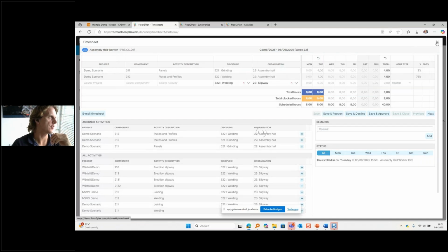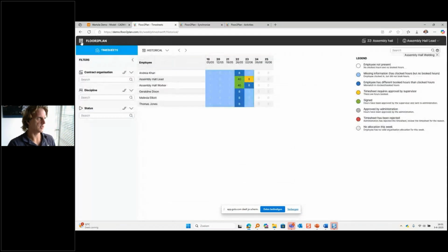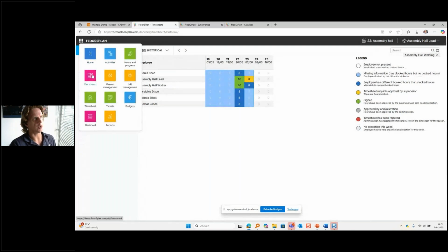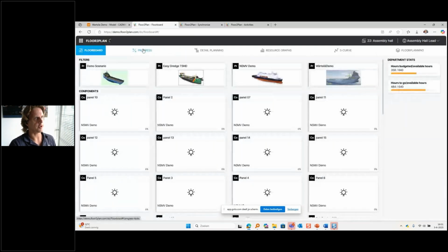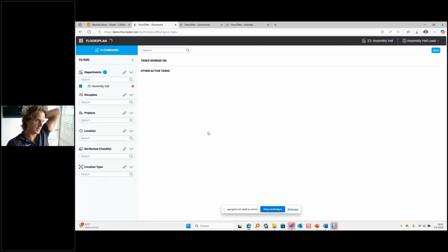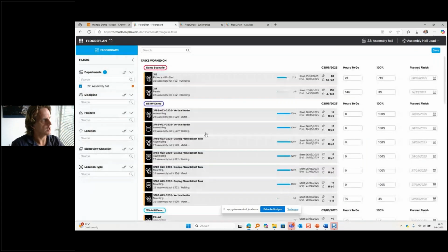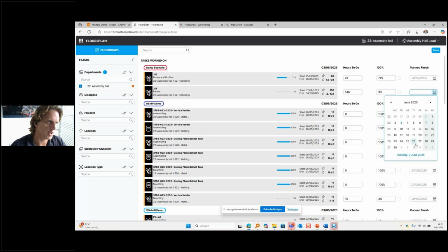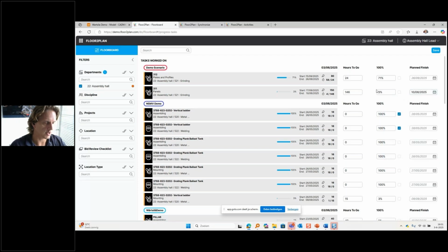And when I've approved this daily timesheet, once a week I go to the progress bar, and here I will find the activities that are assigned to me in my shop. Those are all running activities. And now the question is, where are you with your progress? So I can say as a supervisor, well, this one is ready, this one is ready, this one will take a week longer, and this requires 2 men, 2 days, so that's 32 hours, and then we are done.